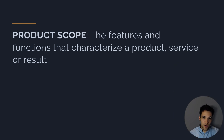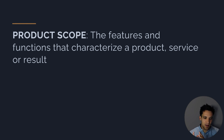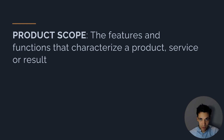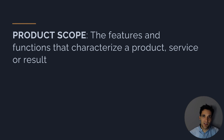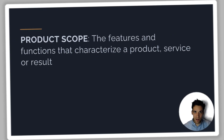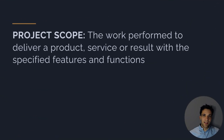Now let's talk about the difference between product scope and project scope. Product scope is the features and functions that characterize a product, service, or result — it's all about the product we're delivering. For example, for a bridge, product scope would be the number of lanes, the type of road surfacing, the type of lighting — all these features that form part of the finished deliverable to the client. Product scope is therefore a subset of project scope.